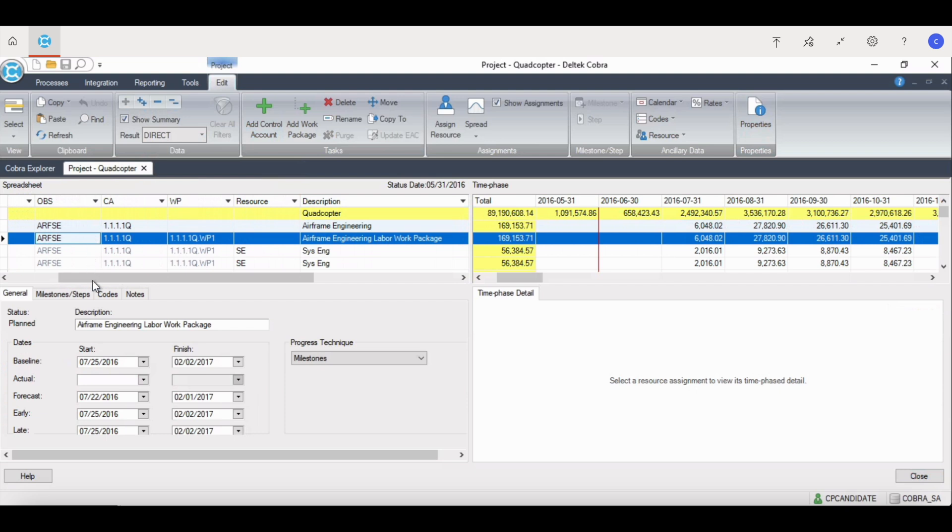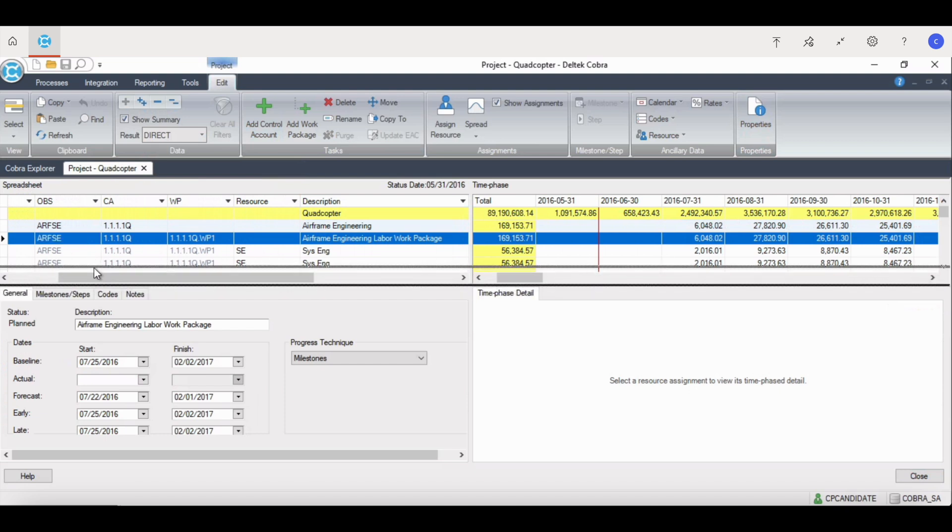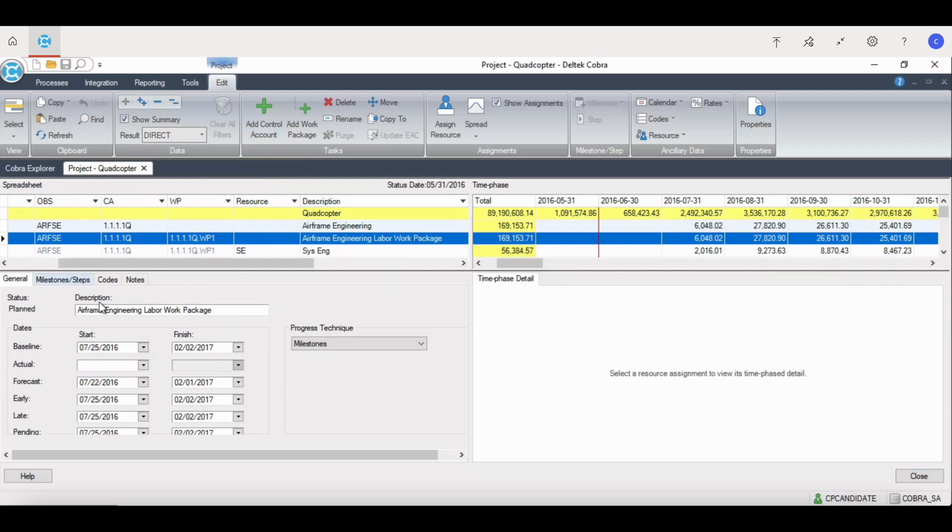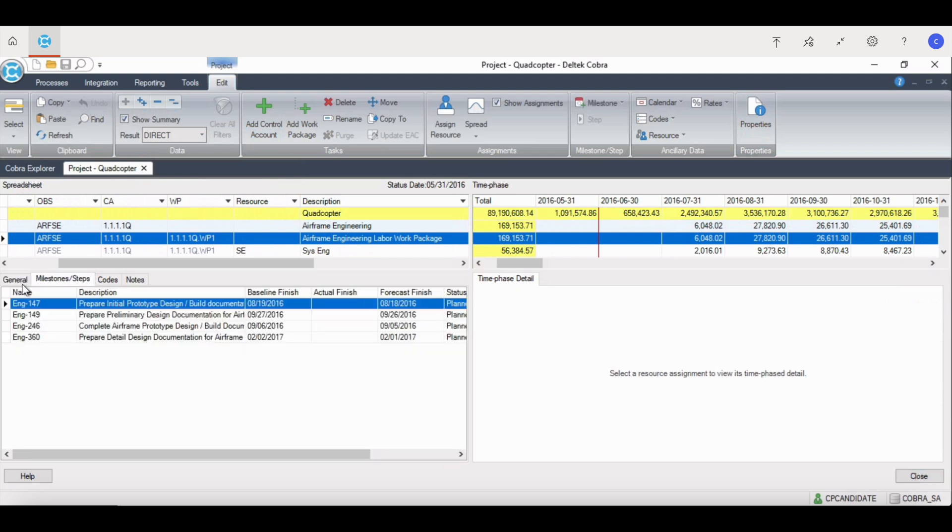This quadrant shows baseline start and finish dates, actual start and finish dates, as well as many others as you can see here. It also provides the progress technique for the work package.